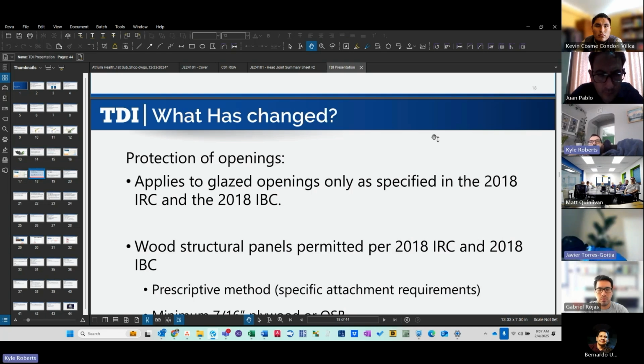It's very important to get on these projects early, and we've worked with a lot of clients down in Texas and have informed them of this, and they do get involved pretty early, even during the bidding process, to determine what glazing makeup is going to be required. And sometimes they get multiple answers that are conflicting. And then they come to me, and the architect says, according to ASCE 7, we can do this.